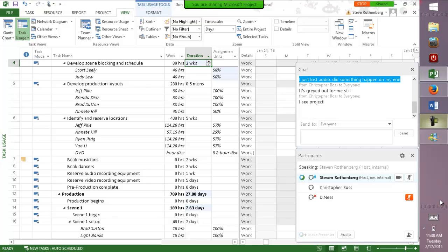But to do so, if I tell you that you have a week to do something, and you're going to have to work full time, 40 hours. And then I say, yeah, you really have 2 weeks. And you go, oh man, now I can goof off for half the time. Now I really only have to work 50% of my time. That's exactly what the work equals duration times units formula is. That's the situation that it's describing.